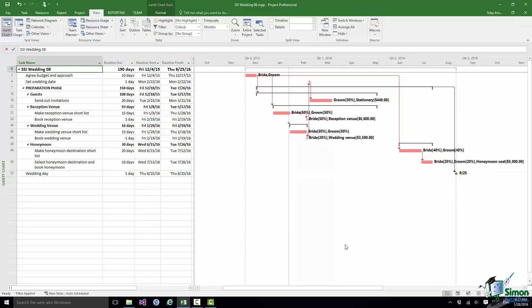The first gap that's after Agree Budget and Approach and before Make Reception Venue Shortlist, there is actually a task active there which is Making of the Guest List. And there are dependencies on that although the dependencies on making the guest list are based on its start date not its end date which will sometimes stop a task from being critical anyway. But the gap here is largely down to a combination of leveling and task prioritization as well.